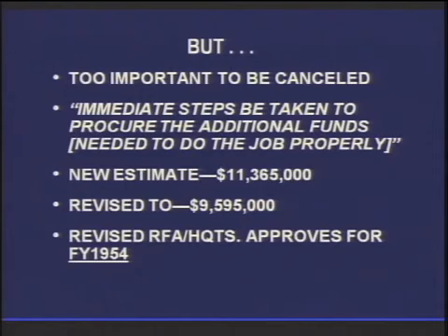This is really a little bit more increase than you might expect, because there's been some significant changes in this cost escalation factor. It's no longer 20% across the board. It doesn't apply to some things anymore, and some other things it applies. It's different from 20% and that sort of thing. So Langley fires off a revised RFA. Of course, this is all agreed to. They just send up a piece of paper they're already meeting of the minds on, so obviously headquarters is going to buy it. And technically that RFA was approved in September of 1953.